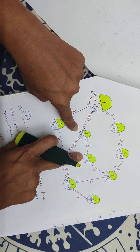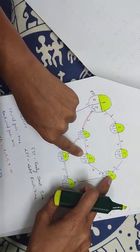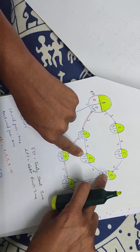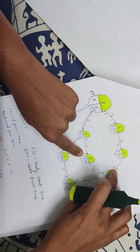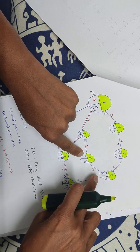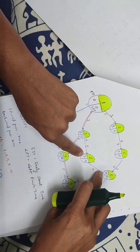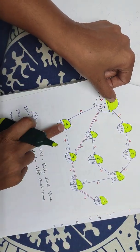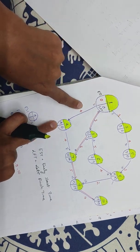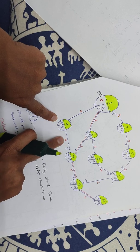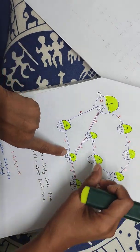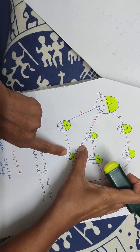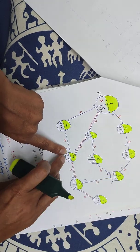Add: 0 to 2 is 2, 2 plus 6 is 5. Adding 7. For 6 to 8 activity, 7 plus 4 equals 11. Maximum of 5 and 10 and 7 and 11, so we take 11 as the maximum early start time.